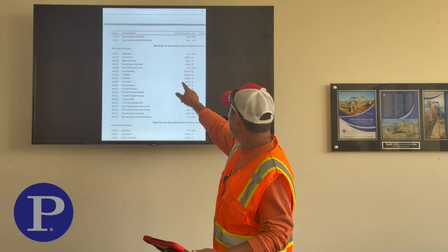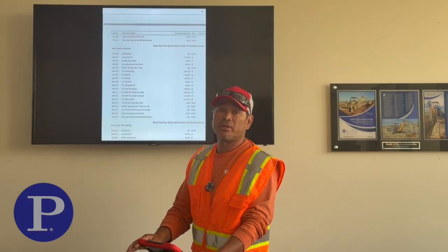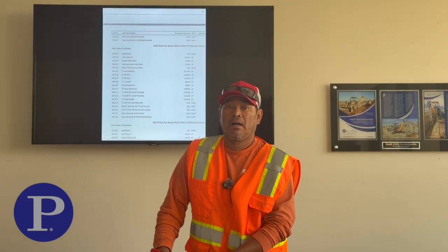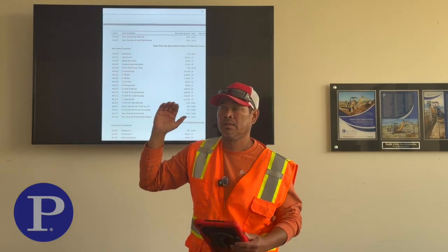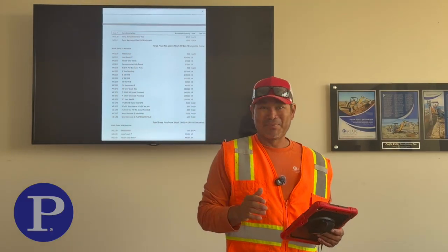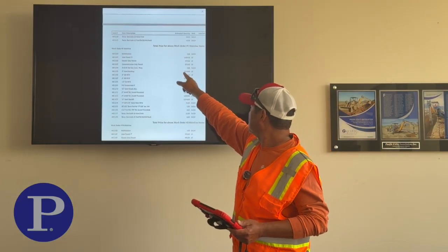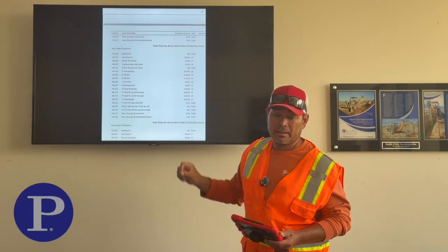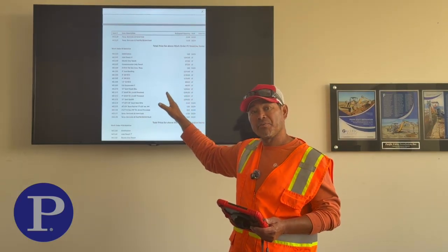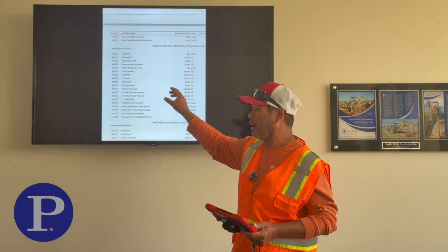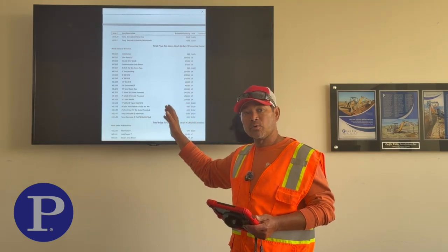In the scope of work, we have the linear footage for the 3-inch pipe that we're going to place on work order 2 on Armor Ridge, I think is the job number. Like I said, we have 2,500, but in just 90s we're going to use about 500 feet. And we're going to use another 60 45s and a little more 22s.